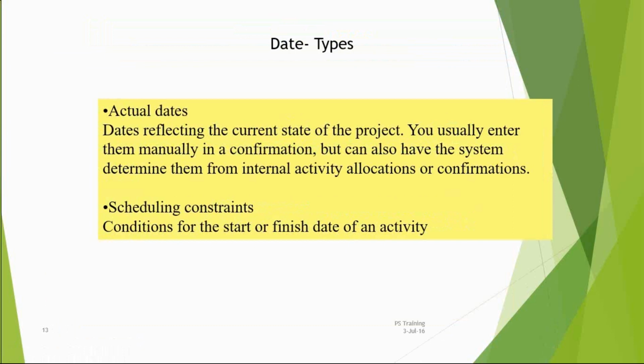One question. Obviously, there could be a case where a partial confirmation could be done, right? Yes. If that is the case, the final confirmation date will be considered as the actual date, is it? Yes, exactly. Every time you do the confirmations, the actual dates will get overwritten.